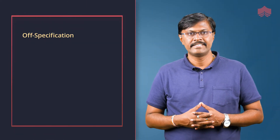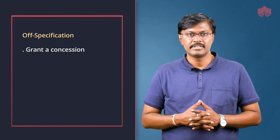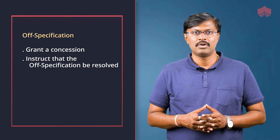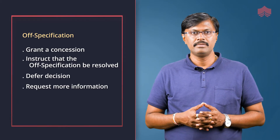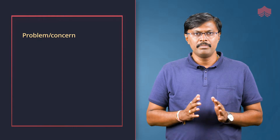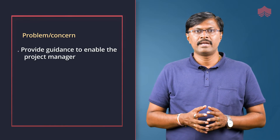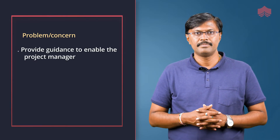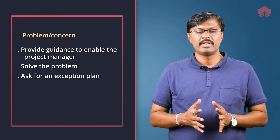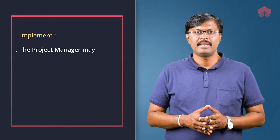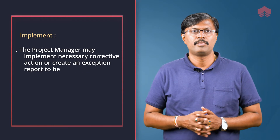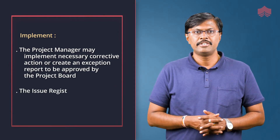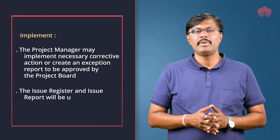For off specification, options are: grant a concession, instruct that the off specification be resolved, defer the decision, request more information, or ask for an exception plan. For problem and concern, provide guidance to enable the project manager to solve the problem or ask for an exception plan. During the implement step, the project manager may implement necessary corrective action or create an exception report to be approved by the project board. The issue register and issue report will be updated.